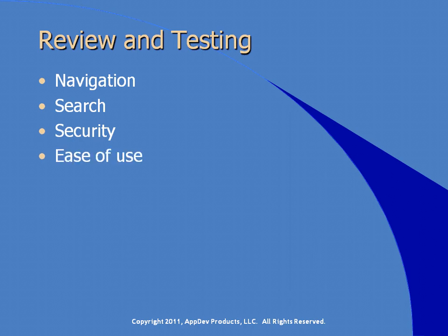Ease of use. Are basic features such as upload, download, search, navigation, task lists, calendars, and Office integration intuitive? And completeness. Are business needs or features missing? If they are, that will need to be addressed. Gather feedback from stakeholders, address their issues, and hold a second review for sign-off purposes. Once the stakeholders agree that the sites meet their general needs, you can proceed with user testing.